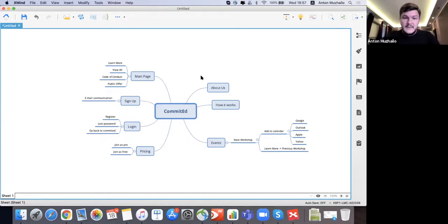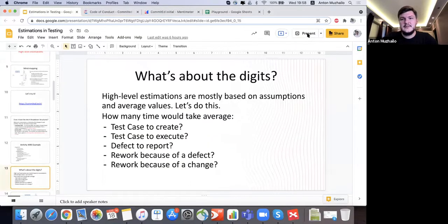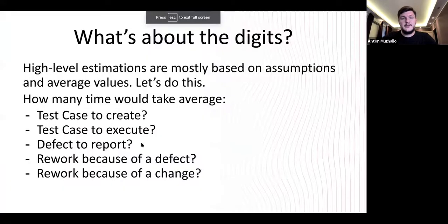So in this case, let's go with this. We need 2 negative test cases per 1 positive. So we can already calculate the amount of negative test cases. It will be 50, because 25 multiplied by 2 is 50. All right, and right now, let's go back to this. So this is only one thing about test cases.